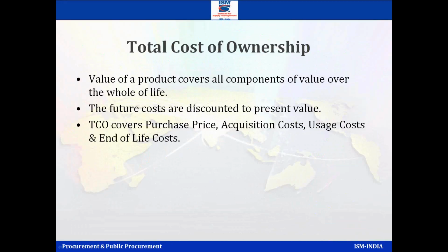But if I look at the landed cost, say from Tamil Nadu to Delhi or from China to Delhi, my cost of transportation may be less. If you include the transportation cost, insurance cost, and also the operational cost, meaning tomorrow there's maintenance or a breakdown and I have to get the service person, all those components added together become the TCO.